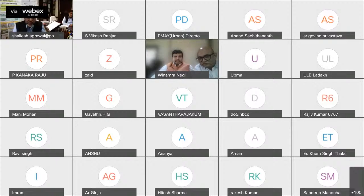So it's a normal curing, 7 to 14 days, and then they remove the formwork, because here they are using some admixtures to gain early strength of concrete. Because of gaining that early compressive strength, tunnel formwork can be removed and taken to the other floor. So the basic difference between this and conventional construction is that here you have early gain of strength, for which you are adding some admixtures. Curing and all is similar to your conventional RCC construction.